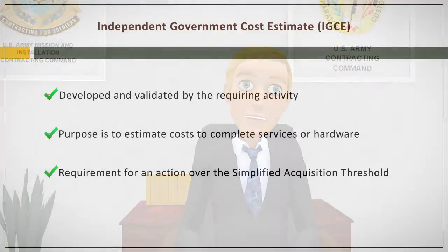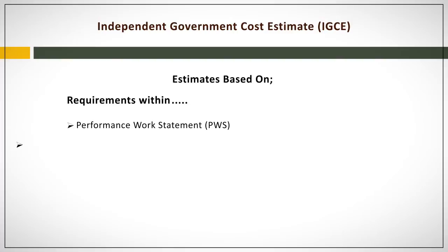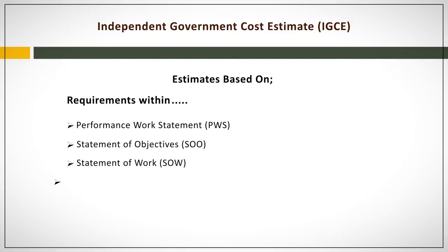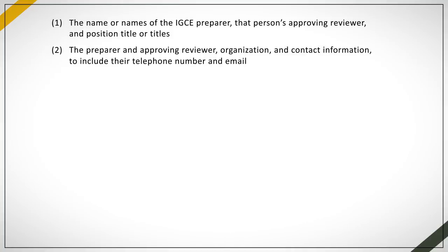Good. So when the requiring activity creates the IGCE, they will base their estimate on the requirements within the performance work statement, statement of objectives, statement of work, or the item description. The extent of IGCE documentation may be different for each procurement, but you will want to immediately look for the name or names of the IGCE preparer, that person's approving reviewer, and position title or titles.